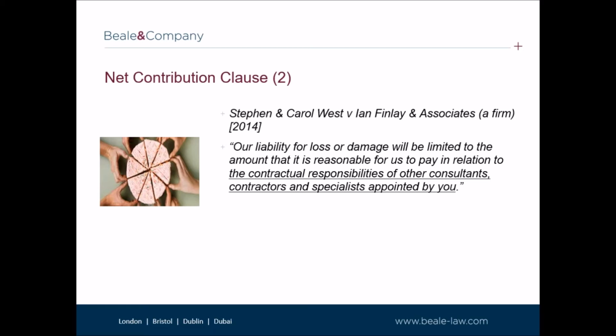Surprise, surprise, the architects in turn sought to rely on a net contribution clause in their appointment. This stated, and the clause is on your slide, our liability for loss or damage will be limited to the amount that is reasonable for us to pay in relation to the contractual responsibilities of other consultants, contractors and specialists appointed by you. The judge was therefore required to consider whether the clause was effective in limiting the architect's liability, where the main contractor was also liable.